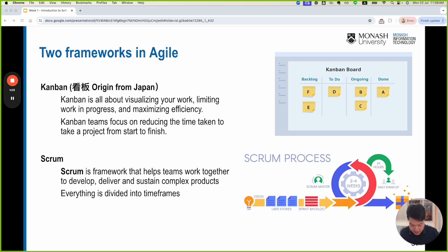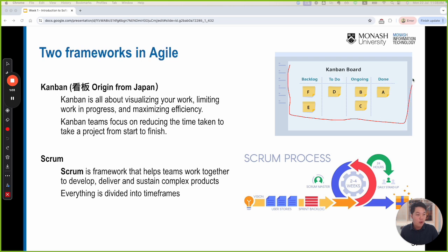All right, maybe I will use the annotate tool. Okay, so first, let's say you create a backlog. So Kanban. This is a Kanban board. This is an example when we use Trello, and these are the 4 columns. Each of the cards represents a task that you need to do, okay? So the backlog is like a to-do list. These are the things that you need to do.